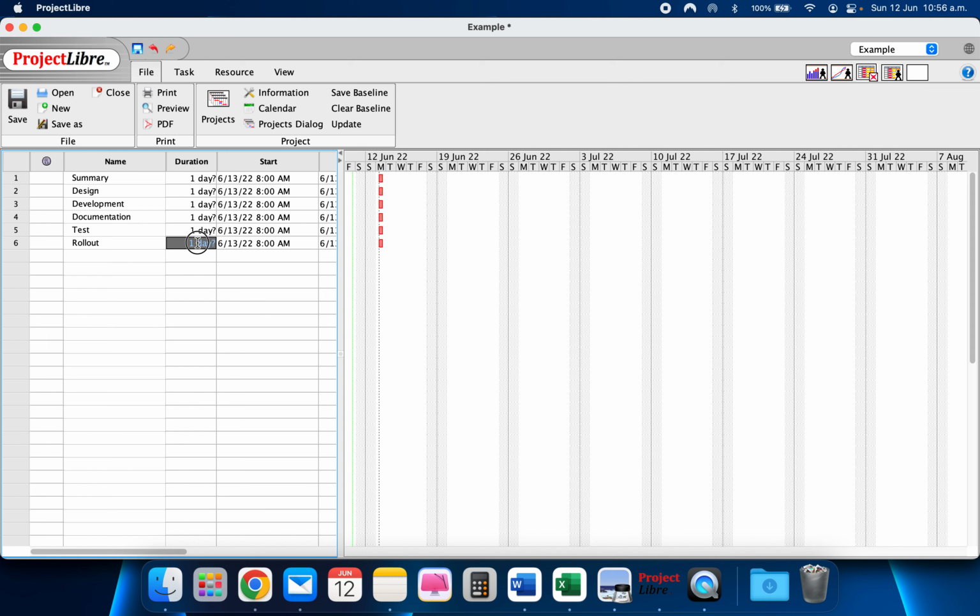And here, as you can see, we have some question marks regarding the duration of each of these tasks. So what we have to do is just click on them and then just put the duration we think it will last. So for example, the first one, it's 10 days. For the second one, let's just write 5 and 3, and for the last one, we'll finish our milestone. So let's just put 0 days, and it will show you right here a little diamond shape figure.